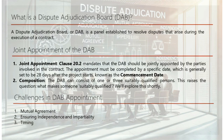Joint Appointment of the DAB: Clause 20.2 mandates that the DAB should be jointly appointed by the parties involved in the contract. The appointment must be completed by a specific date, generally set to be 28 days after the project starts, known as the commencement date. This ensures the DAB is in place early to address any disputes that might arise promptly.